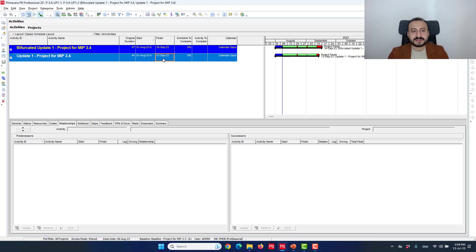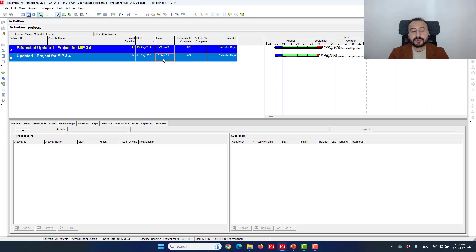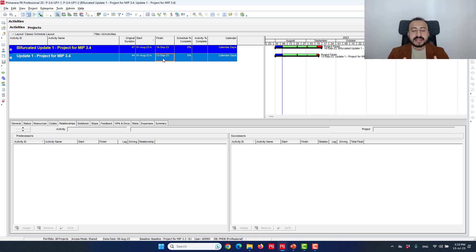Why? Because we definitely have schedule changes, and the purpose of the split method or the 3.4 is to investigate those changes and perform the delay analysis taking into consideration the schedule changes.